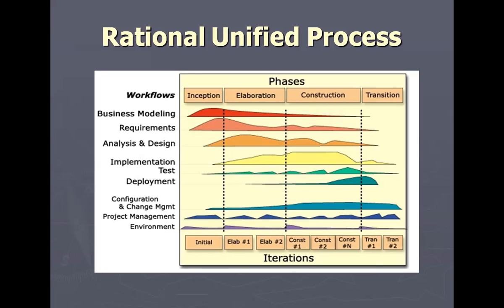The heart of the RUP is truly in its disciplines, not in the phases. During each iteration, you will alternate back and forth between the different activities of the disciplines, performing each task to the extent needed at the time to achieve the goal of that iteration. In other words, during an iteration, a portion of the requirements is selected, analyzed, designed, coded, tested, and integrated with the product from earlier iterations.